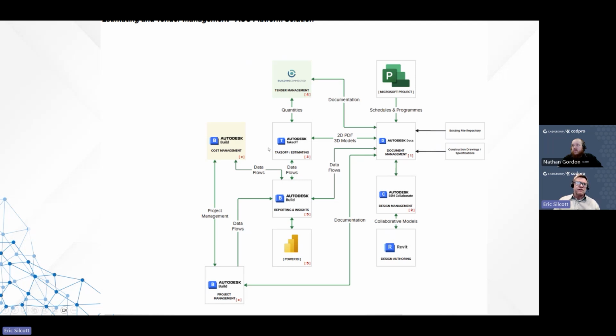And as you compile all these interconnected workflows, tying that into the project management and cost management, so you have a direct relationship to quantification, documentation, cost estimating into project management, job costing, and how that then plays into possibly a tender management process where you're qualifying the subcontractors, putting out a request for pricing, evaluating, soft awarding those subcontract pricing, and moving that directly into the budgeting and cost management side of ACC.